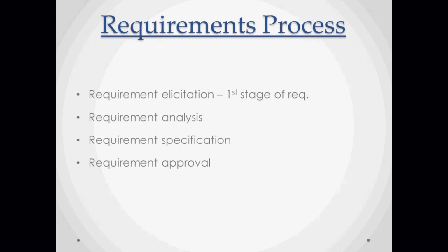They were expecting that once you've documented it, you will bring it to them, present the document or send it to them for approval. Then they will be able to tell you, oh, we need to change it. That's an opportunity for the stakeholder to review everything they've informed you of, because sometimes they may mean one thing and you've documented another. It's an opportunity for them to say whether everything you documented is okay and is everything they want. Then they will be able to sign it off. That's when we say sign off. They will sign it off for you and say, yes, we're happy.